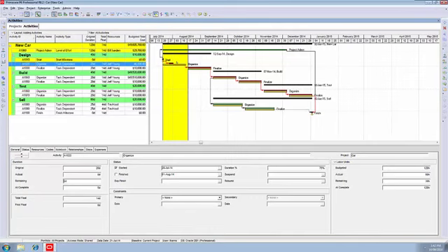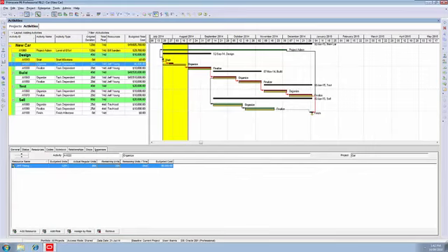Notice that what we see in the Gantt chart at this point in time, before we've scheduled, is not correct. So don't make any decisions at this point in time looking at the Gantt chart. It's not right until we reschedule. So remember, every activity, when you're updating it, requires 3 inputs. First the dates, then the resource hours, then the expenses.